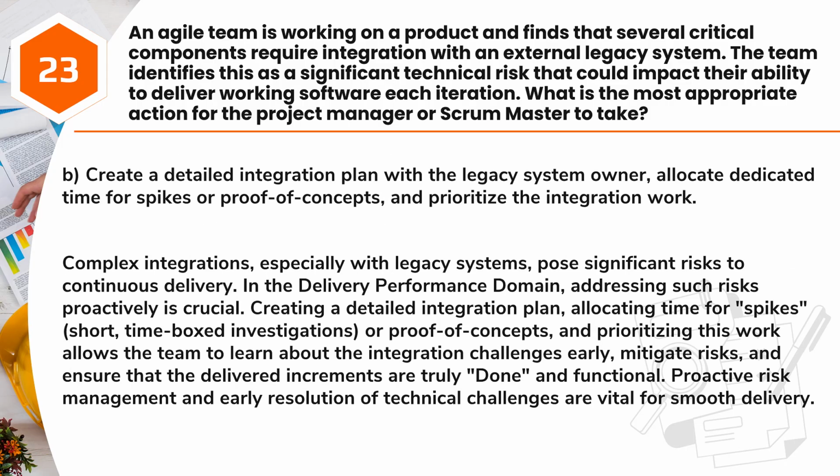Answer: B. Create a detailed integration plan with the legacy system owner, allocate dedicated time for spikes or proof of concepts, and prioritize the integration work. Complex integrations, especially with legacy systems, pose significant risks to continuous delivery. In the delivery performance domain, addressing such risks proactively is crucial.